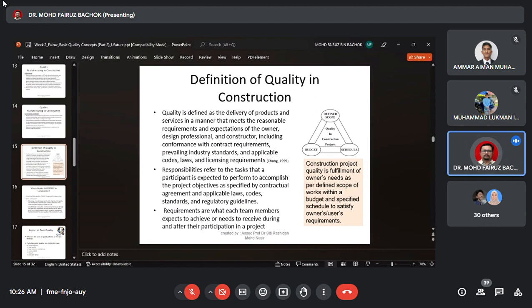over budget. Sometimes once the thing is being constructed at site, later we see there's a shortcoming in the design. And the client asks me, okay, I think better you put an extra column for the estate value. The design is okay, the safety is okay, but your client feels that if you put another extra column, the estate value of the building will increase, and the stability of the building. That will be extra budget. Okay, that's why again you must have a good justification and it must be agreed by your client.